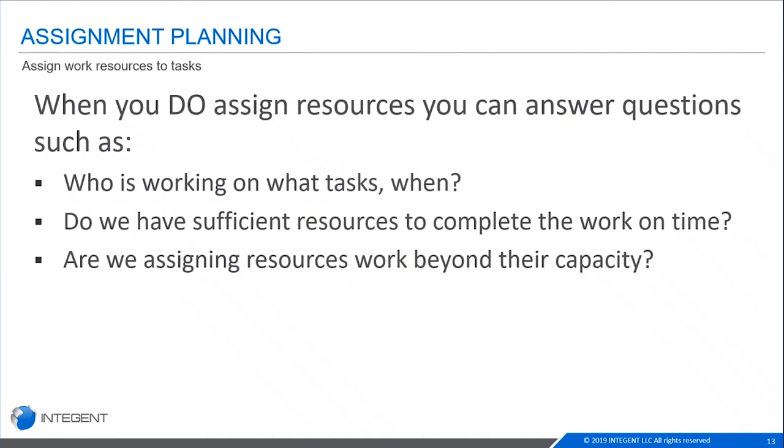So one important thing to mention about Project is it is a very dynamic scheduling tool. You can take full advantage of it by giving as much information as you know about your project and your tasks and your resources to Project, and it will do all of those back-end calculations for you. When it does a scheduling pass, it does a forward pass, which means it starts from front to bottom, and then it does a backward pass from the bottom to the top to make sure that everything makes sense and has its place.